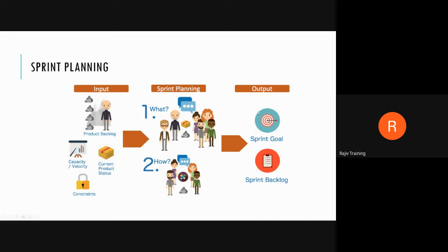Sprint goal is the summary of the sprint backlog. For the management, if they ask what the team is doing in this sprint, you cannot go through each and every user story, right? That looks bad. So you have to summarize in one or two sentences. For example, the goal of the sprint is to complete registration and start working on login. Something like that, at a high level, one or two sentences. That's your sprint goal. So the output of the sprint planning